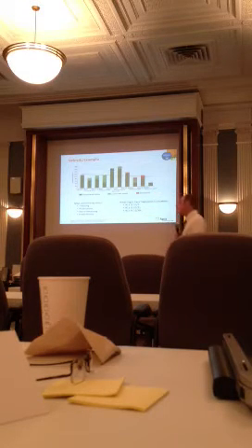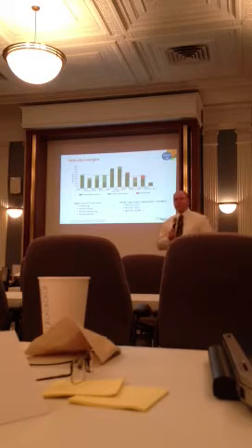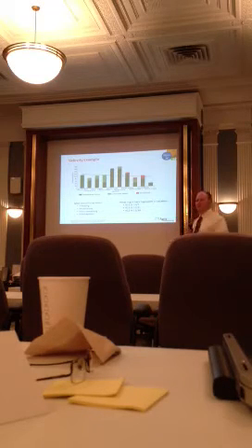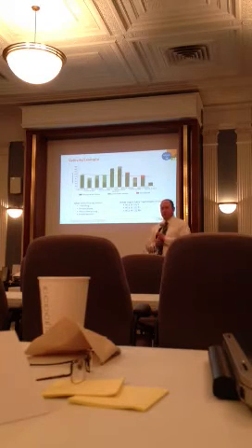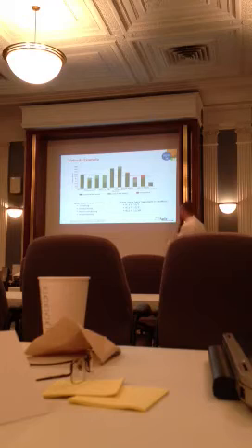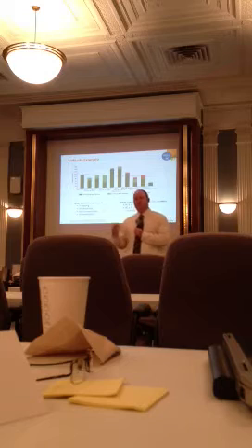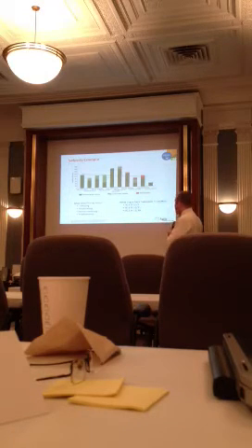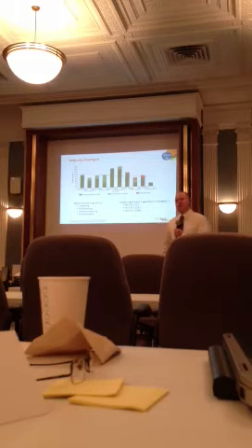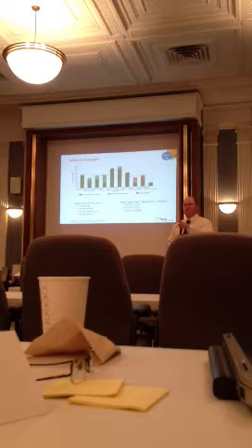So you can see that a new team here, just gelling, using people that may not be completely familiar with working with each other, you have more flux in how many story points you're going to knock out each iteration, right? So we committed to 165-ish, and we only got acceptance on 150. Not terrible, but we got acceptance on 150, okay? Now there's a little sliver of red here that's still red 2 months later. What do we think that is? Yeah?